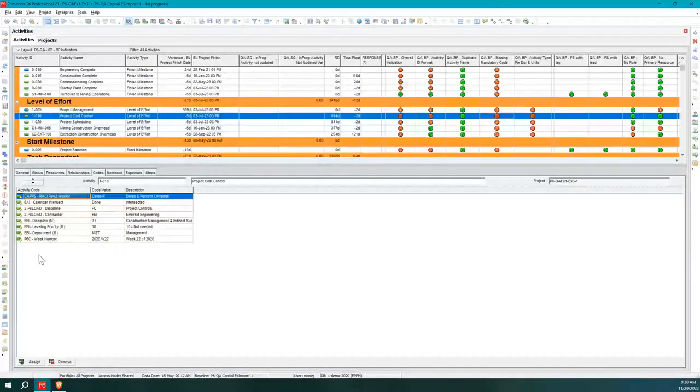So some of these codes are mandatory. Things like discipline, things like phase, those are often ones that you're going to use in your standard dashboards, okay? And we want to make sure that they are filled in, they're not missed, because otherwise your dashboards will not be complete. So as more and more of our clients drive into standardized dashboards across their portfolio, their program, and within a client group, and of course across their projects, we want more standardization.